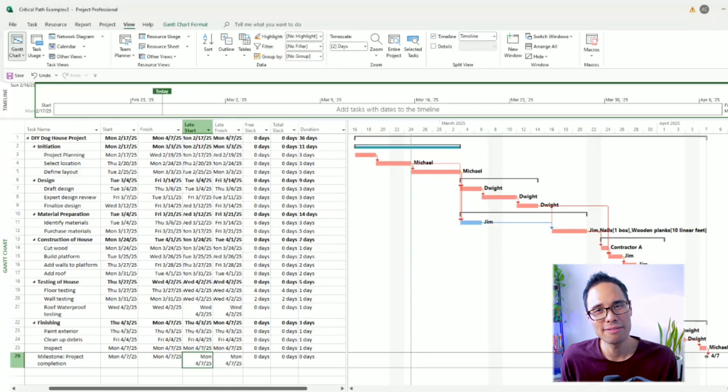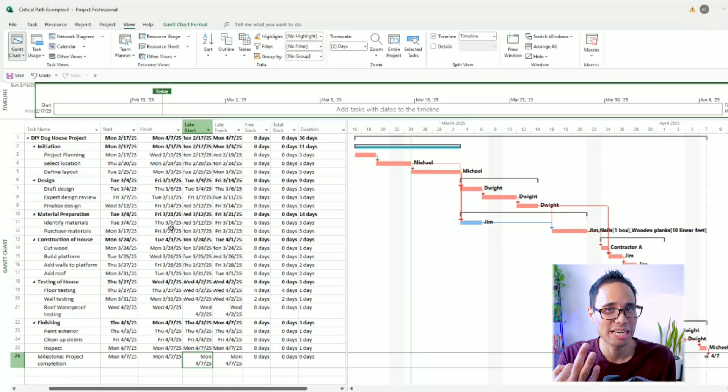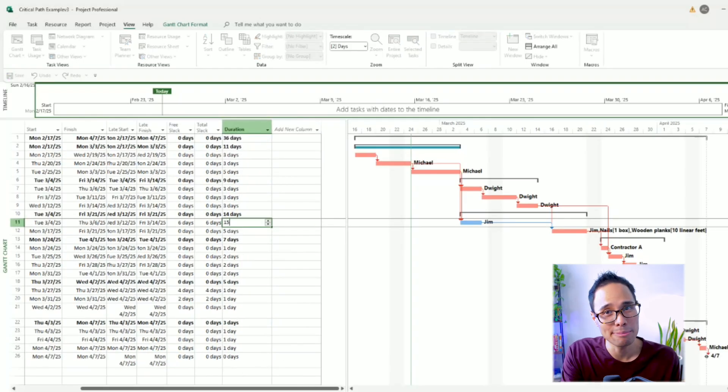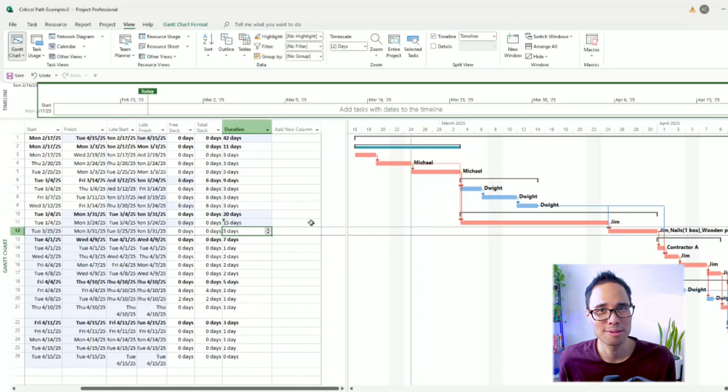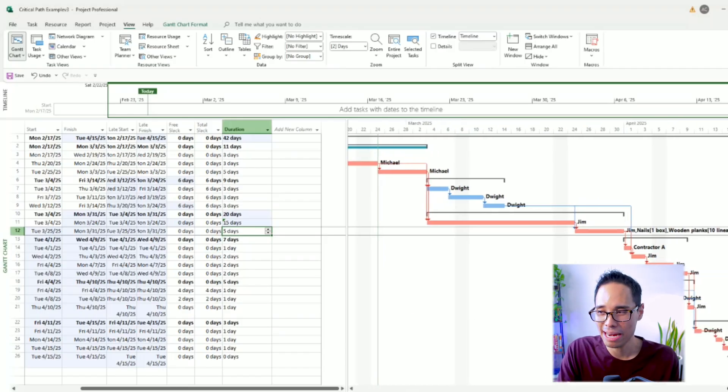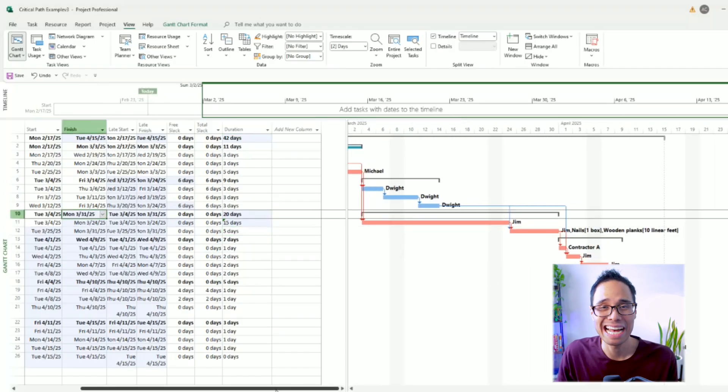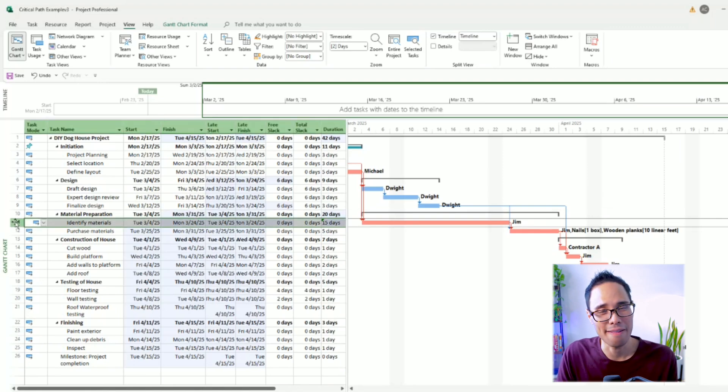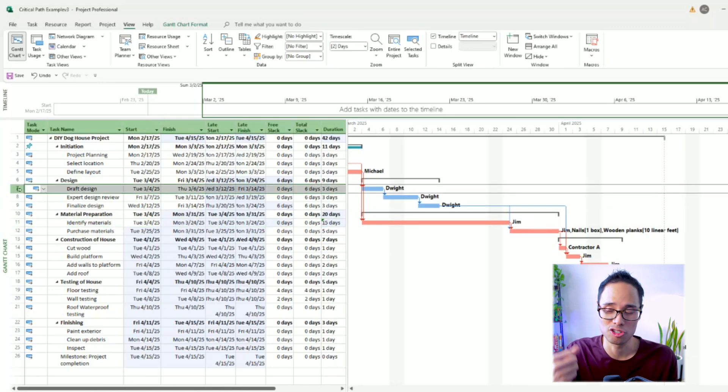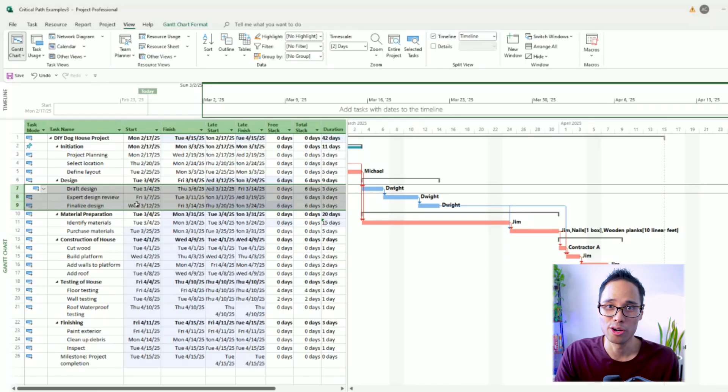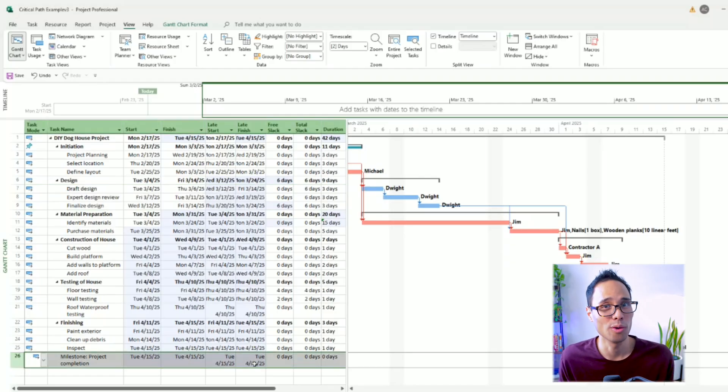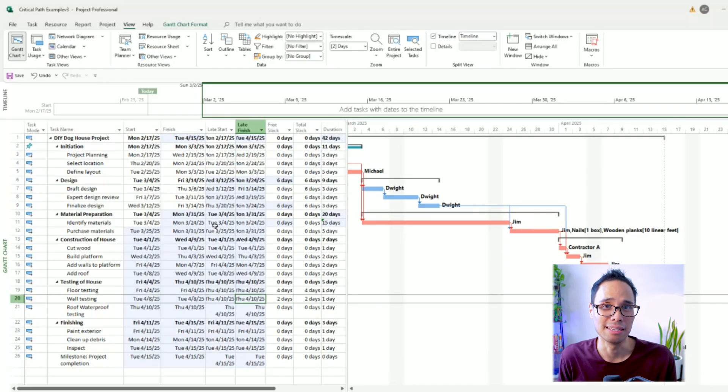So instead of having the task for identify materials take only three days in duration, let's change it so it takes a much larger time duration of 15 days. When we make this change, this task automatically goes on to the critical path. The task itself turns red on the Gantt chart. And the three tasks above it for draft design, expert design review, and finalized design are no longer on the project's overall critical path. And guess what? Our project's finish date has been pushed back to April 15.